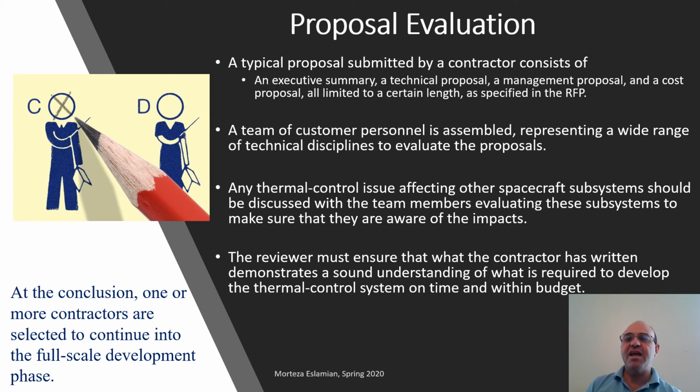So then the customer sends out the request for proposals. Multiple, let's say, private companies or maybe government entities, bid on that proposal. The next step is to evaluate the proposals and choose the best one. So again, this is applicable to any other project, not only a spacecraft.